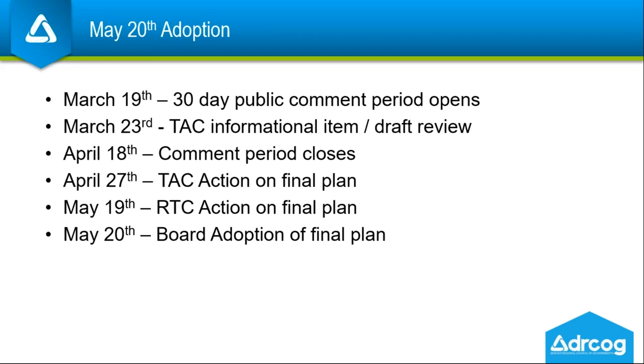The 30-day public comment period started last week, March 19th, that was last Thursday. Today is the TAC informational item. The public comment period closes April 18th, so please submit your comments before that date. April 27th, I'll be coming back to TAC for the final plan action item. May 19th, we'll be taking the plan to RTC as an action item. And then if all goes well and as planned, the board adoption is planned for May 20th.